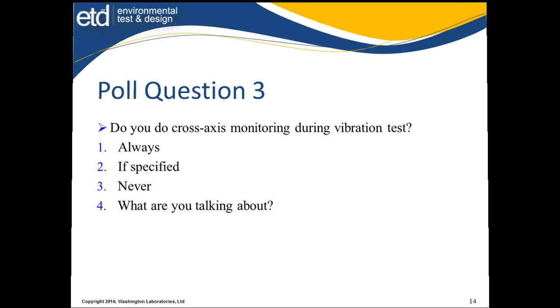Let's try to do a little bit of a summary here. Schedule it. Arrange early and communicate regularly. Get this test program going way ahead of time. Forecast to the lab when you think realistic things happen. Keep the lab informed as issues change that. Start confirming. The lab will coordinate with you. Almost all of them have follow-up things to make sure everything's still on track.